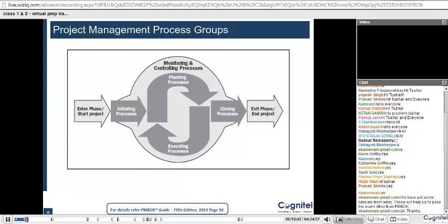We left it yesterday on this slide, which was project management process groups, and I explained how these 5 process groups work together. From initiation, you go into planning. From planning, you do execution. Then from execution, you might correct some of your planning, so you might go back to planning, then again execution. This cycle would repeat itself for as long as it is required for the successful completion, and then you would be closing your project or a phase.